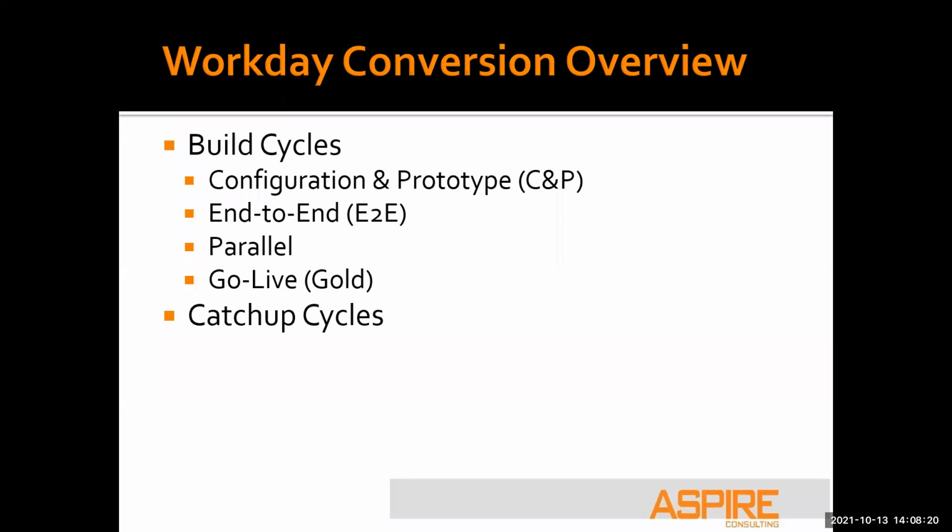A build is an iteration of loading data into a Workday tenant, doing some sort of checkout or testing or comparison back to your source system, and then seeing what kind of issues you ran into through that build, and then preparing for the next build.